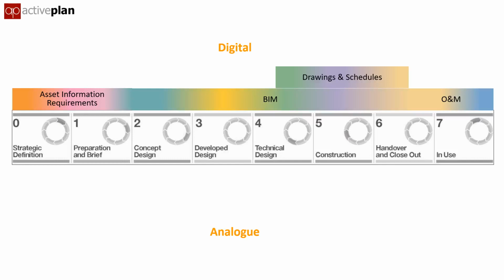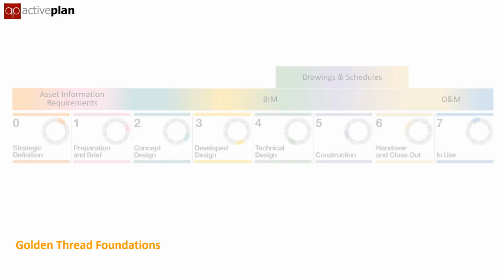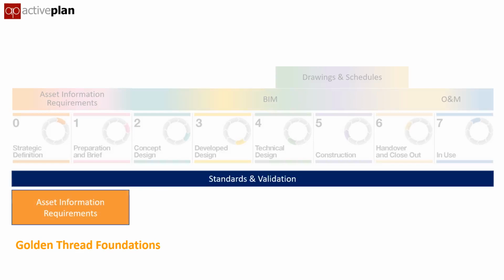Product and procurement schedules should be generated from the software, even if it's just Excel. It makes sense to read their digital outputs into the data model and generate the required documents from the coordinated data model, geometry and data. To ensure the right data is being provided in the right format, we need to start by providing designers and the supply chain with a clearly defined asset information requirement. This creates the auditable standards and tests each submission from stage 3 onwards.